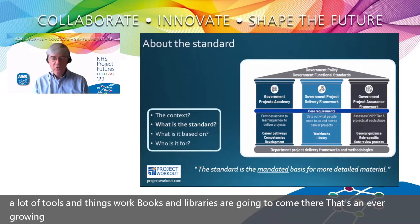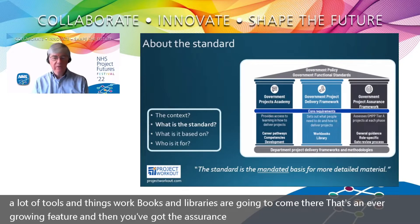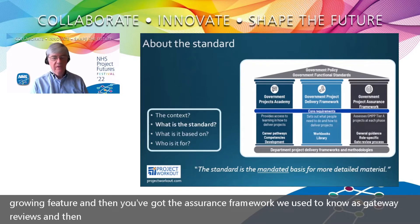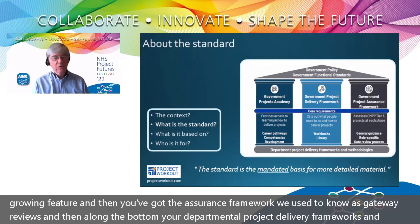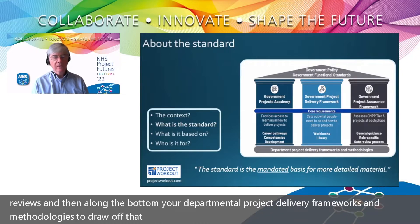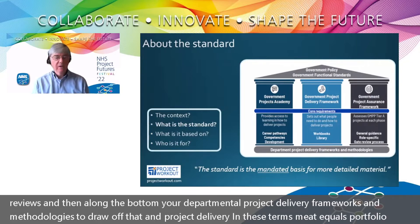The IPA presents this as: government policy at the top — the things we have to do — then the government functional standards, plural. Then the IPA producing the academy and training development for all. Then there's the project delivery framework with tools, workbooks and libraries — an ever-growing feature. Then the assurance framework, what we used to know as gateway reviews. And along the bottom, departmental project delivery frameworks and methodologies. Project delivery in these terms equals portfolio, programme, and project management.